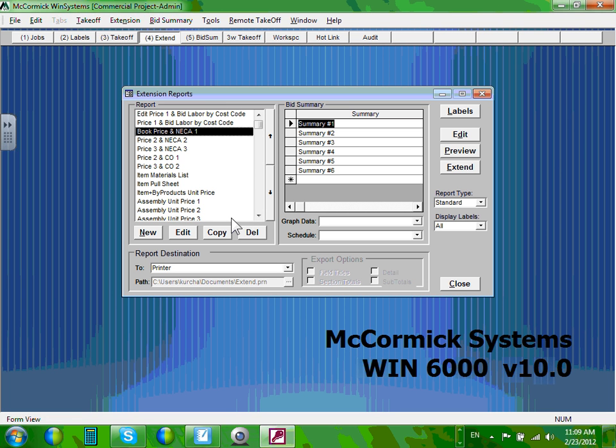Again, you have to know where you are in the country when you bid these jobs. So we're going to be bidding on NECA, National Electrical Contractor Association. NECA 1 means the job is easy, not difficult. 3 is difficult. And book price is basically the cheapest price. That's what we're going to be doing. Cool? Now, can I run NECA 2, price 2? Yes, that's more expensive, labor and material. 3, yep. All these reports are there for you.